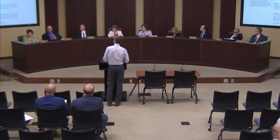Scott, first I'm going to ask you to define the construction manager as constructor, the CM position, and what it does, and then I have a couple of questions after that. Okay, two methods of construction typically are what LPS would use. One is design-bid-build, where we hire an architect, design a project, put it out to bid. A month later, the bids are submitted, and we take the low responsible bidder. And so the contractor is not involved at all during design. It's basically the owner and the architect. That may take several months, and then it goes out to bid, and we accept the results. Sometimes the results could be over budget or under budget, but we look at the numbers, digest them, and make a recommendation.